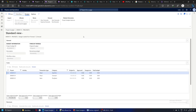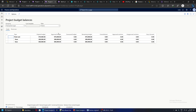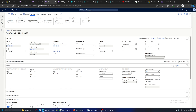Now that the project budget is approved we can move ahead with project transactions and see how the project control functionalities work. Let's quickly see the project budget balances screen - this is a snapshot that shows, for example, the original budget, item-wise approved budget, consumed budget, remaining budget, and committed - all this data is being shown.